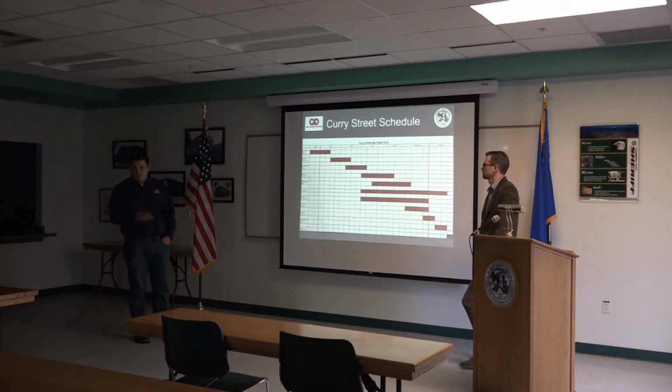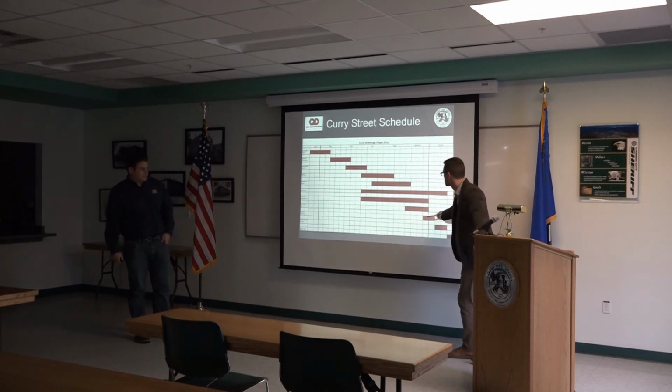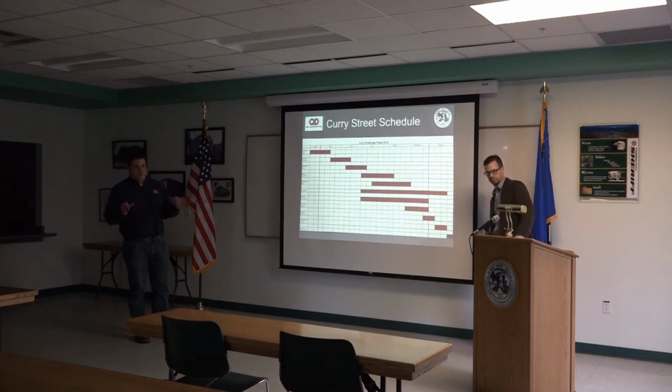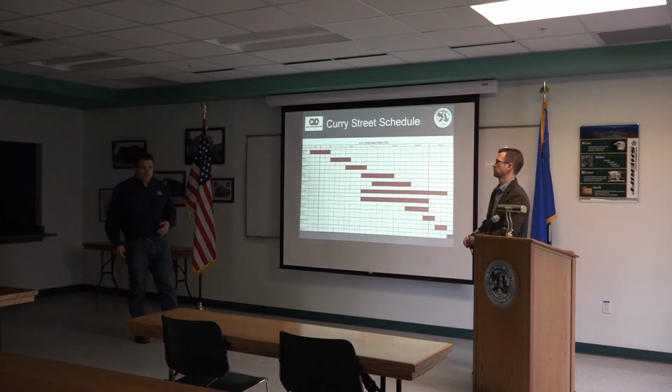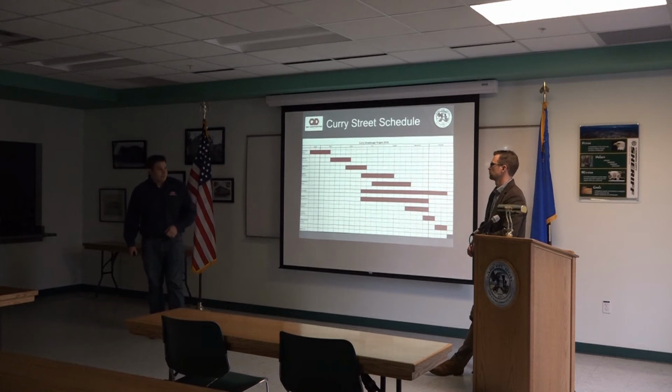It'll be a similar process to what was on Carson Street. We'll pulverize, cut the grade out, and then get it ready to pave. It'll probably be a couple-day process for paving, so there's a little bit of impact there. And then we also have the Telegraph improvements after we pave: new paver crosswalks with a raised concrete pad. After that, we'll get it striped and finished out and have it pretty well completed for Nevada Day. There might be some little stuff after the fact, like tree planting and landscaping improvements that may be going on as well.